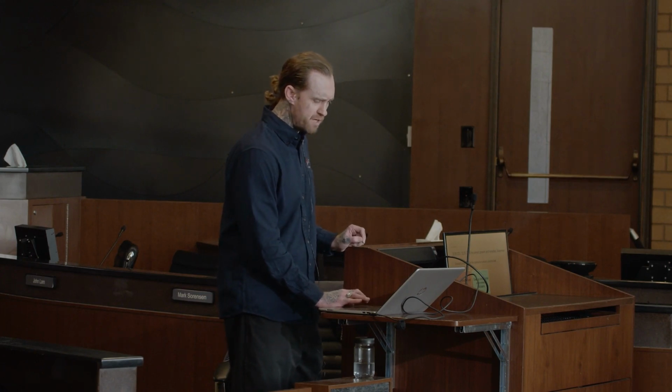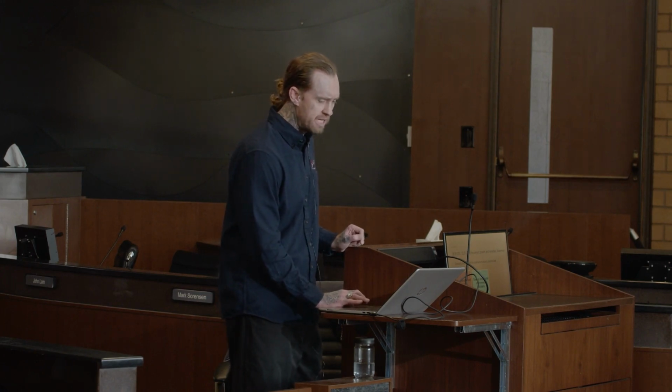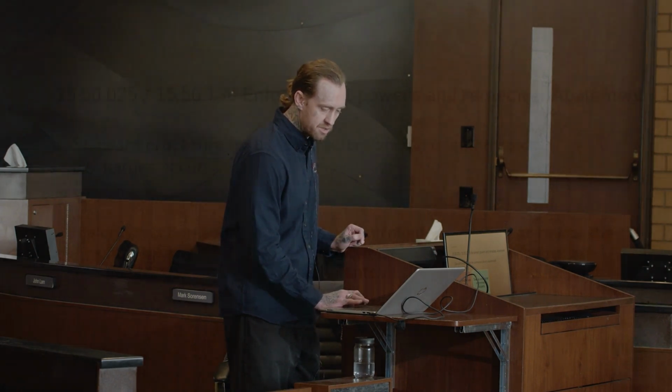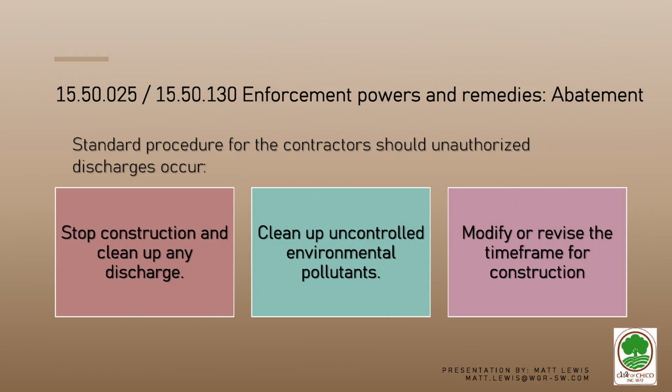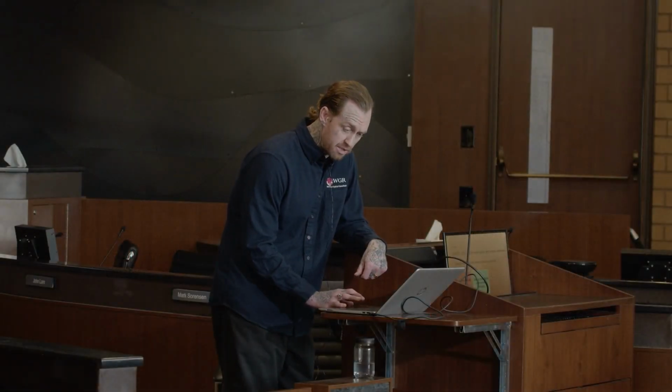to ratchet it up. An inspector can require abatement within 30 days of notification for uncontrolled sources of pollutants that could pose an environmental threat. All construction activities can be required to cease until such problems are adequately addressed. If a situation persists where pollutant-causing sources or activities are not abated, any responsible parties contributing to the spill can be billed if deemed necessary.